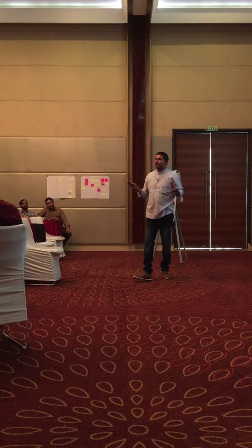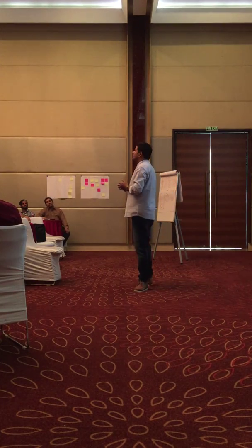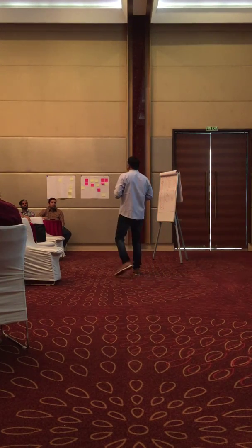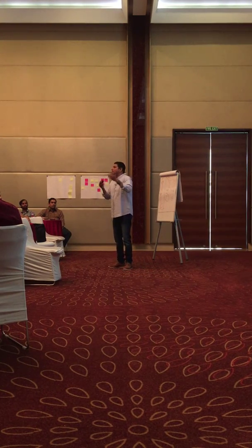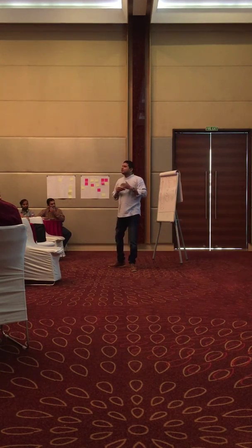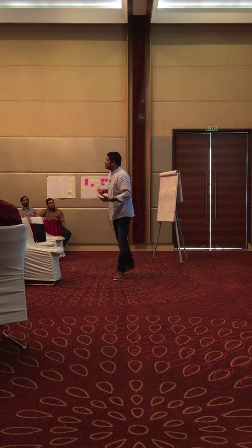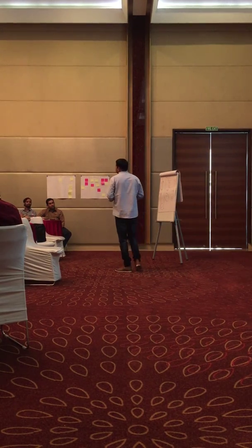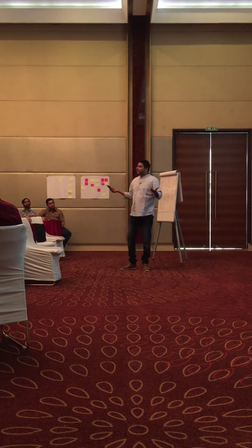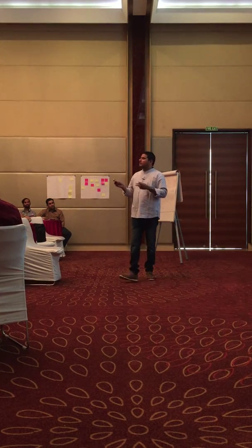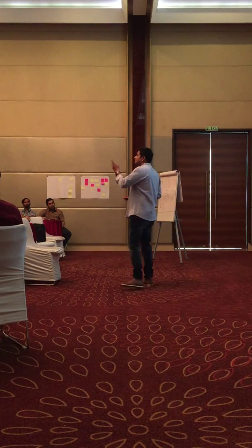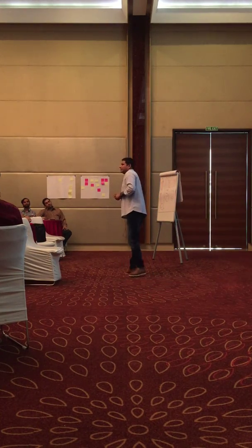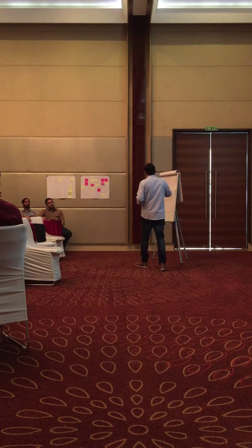So you built all the website, everything is ready. Now when it comes to integration of PayPal, the team identified that it is not possible to integrate because of the technical architecture that they have chosen for the project. So what is the impact? All the money is wasted, product success rate is deteriorated. So fail fast, fail early, that is an agile concept, right? If something does not work, maybe you may change it. That is why agile software development is a guided missile. Yes? Good. So value, cost, and risk.